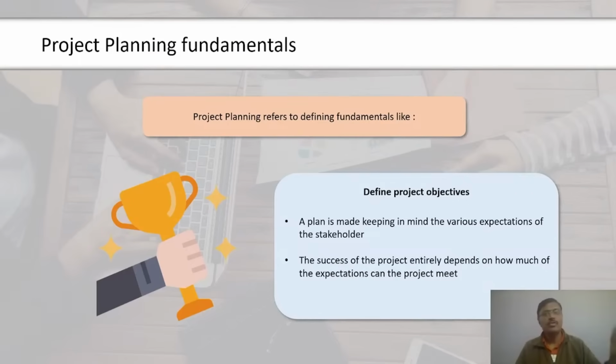Now, let us look at the tools and techniques used for estimating activity durations. First is expert judgment, which means using previous project experiences in estimating the current project duration. This can be used with other estimation techniques and used to reconcile differences if different techniques result in different estimates. Three-point estimating is a method where three estimates are used instead of one. It is part of a project management philosophy known as Program Evaluation and Review Technique, PERT.